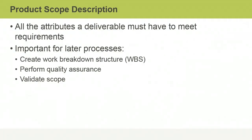The Product Scope description identifies all the attributes a deliverable must have to meet requirements. You use it as a baseline to create the work breakdown structure, which divides the work into more manageable work packages. You may also use it for later quality assurance activities, like quality testing and scope validation.